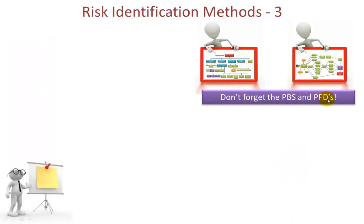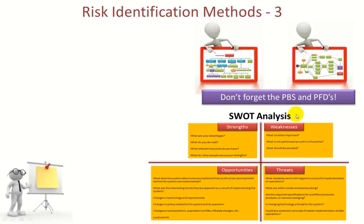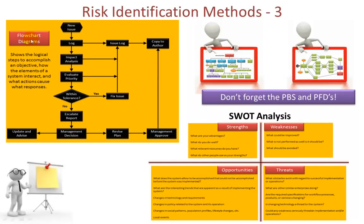Don't forget the product breakdown structure and product flow diagrams from PRINCE2 product-based planning. Identifying which products are needed and the sequence in which they're created can allow you to uncover potential risks. Using SWOT analysis — strengths, weaknesses, opportunities and threats — any one of the strengths could help maximise an opportunity or reduce the impact of a threat, and weaknesses the reverse; brainstorming these helps manage risks. Flow chart diagrams showing sequences — for example if you were writing a piece of software, the steps and sequences may throw up areas where risk needs to be managed within the development.